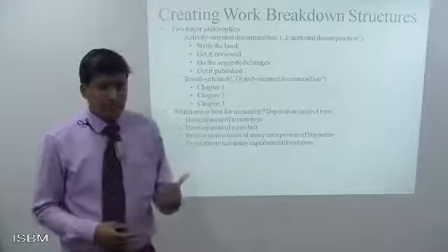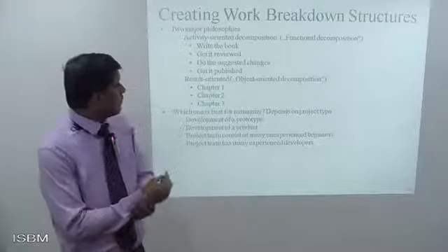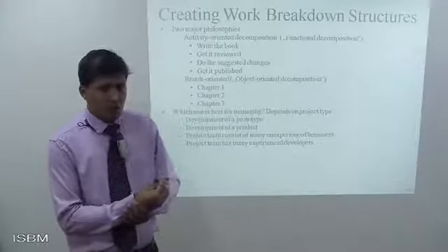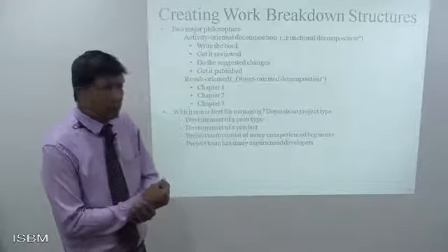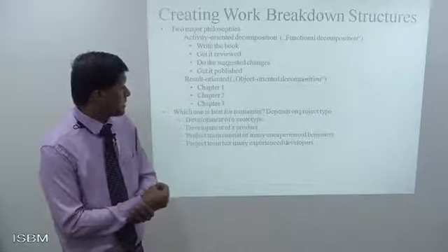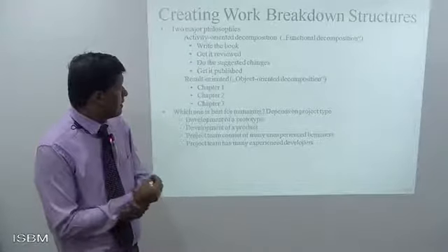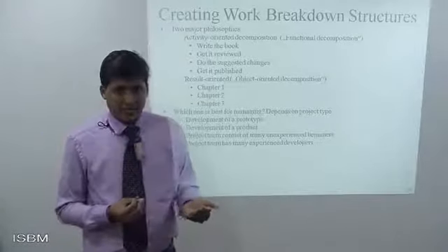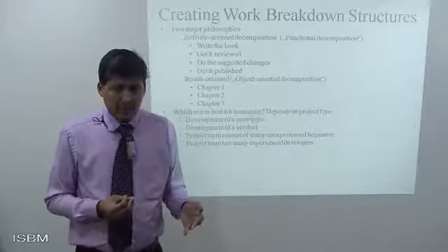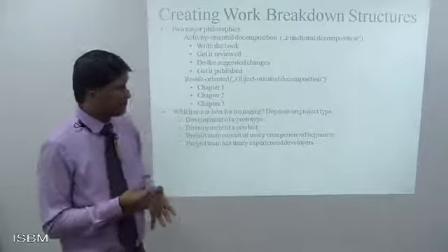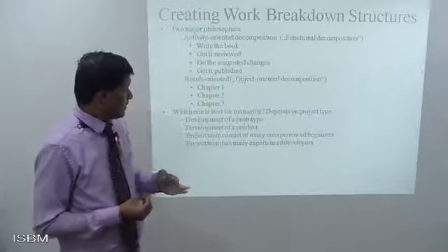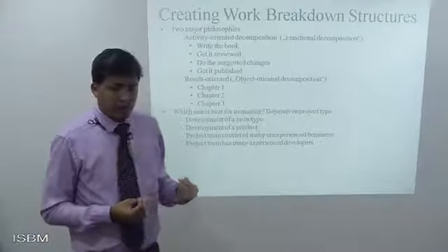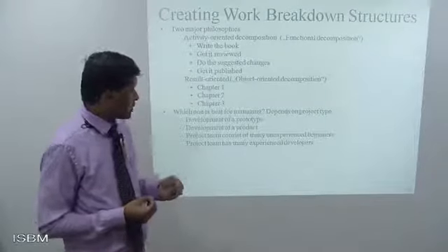How do we create a WBS? Two major philosophies are involved. One is activity oriented, so it could be writing a book, getting it reviewed, suggesting changes, getting it published. Or it could be result oriented. So one could be activity driven, the other could be result driven, wherein the result could be put on the heads of chapters.